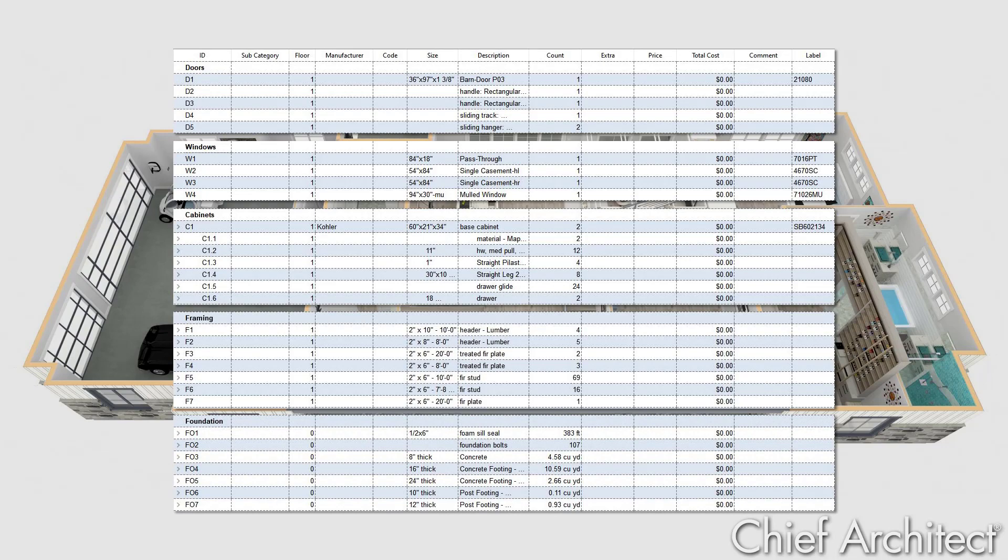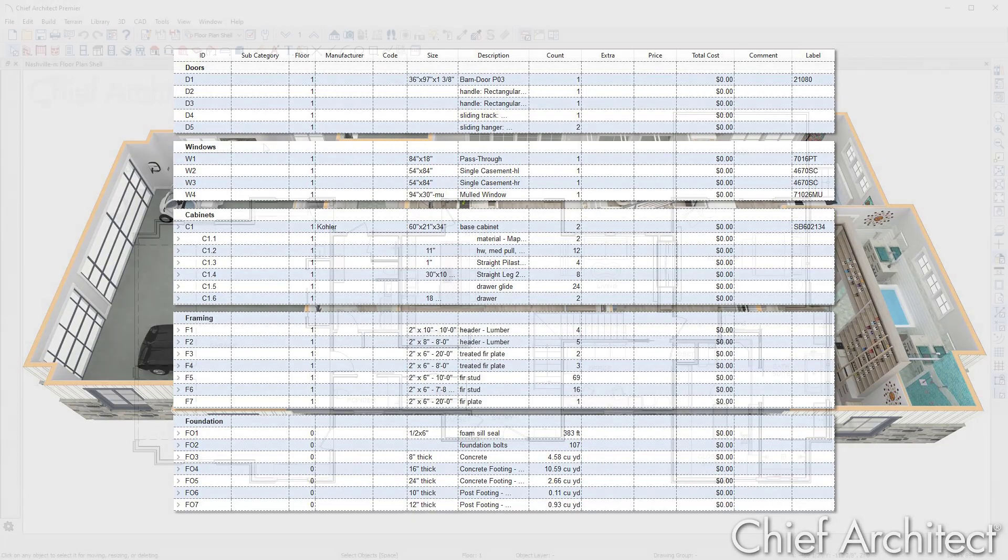At any point, the program can generate a materials list, which makes it easy for cost estimates. While some programs charge more for cost estimating, Chief Architect bundles this feature into the program without extra cost.